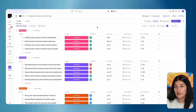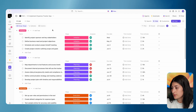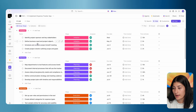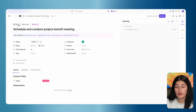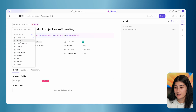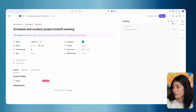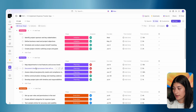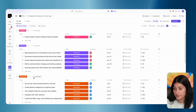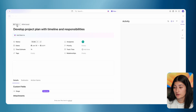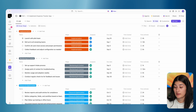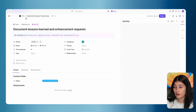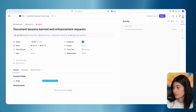Now that we have our tasks created, let me show you how to set milestones. In my tasks, I have a few milestones — my 'schedule and conduct project kickoff meeting.' I'm going to set this as a milestone by clicking on the task, clicking where it says 'task,' and setting it to milestone. My project kickoff meeting is now set as a milestone. Let's look at other milestones — 'develop project plan with timeline' is also a milestone, so I'll do the same thing. And the last milestone is documenting the lessons learned. I'm going to set this as a milestone as well.